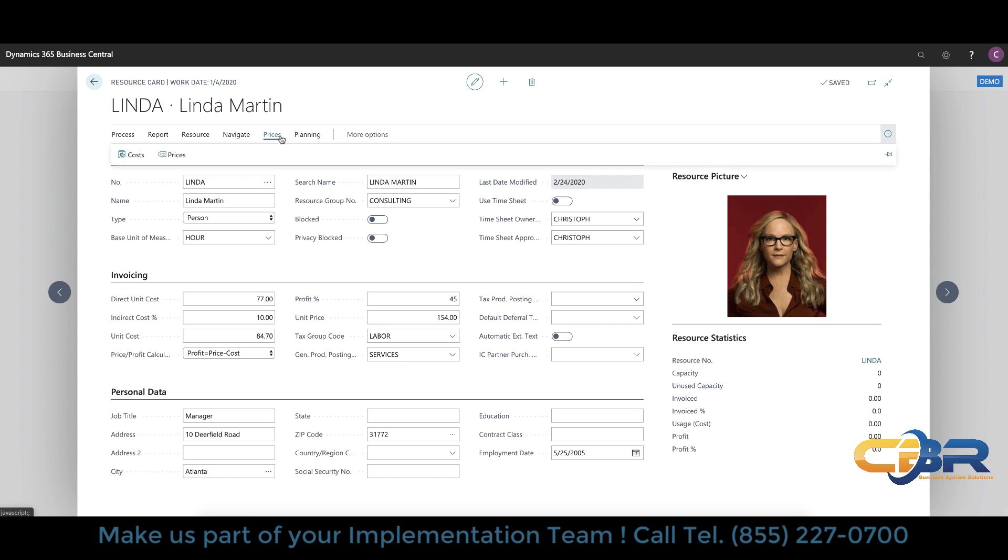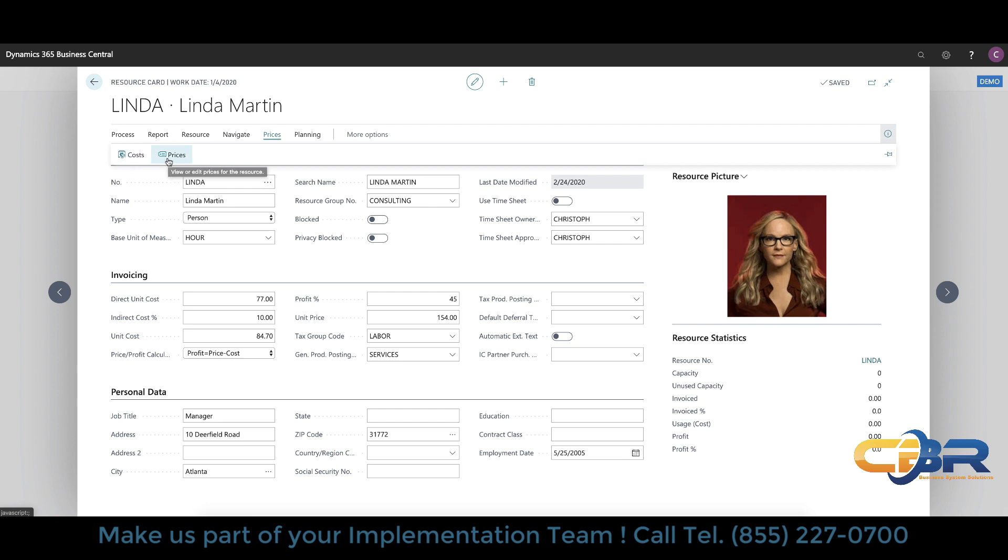In addition to that you can also set up costs and prices for each resource. So different resources might cost you different rates in different markets. So if you're dealing with any sort of prevailing wage situation you can adjust the rates that the resources cost you depending on what area they're working in. Same holds true for prices so that's all done in here. From a planning perspective you can also do resource capacity planning and set up a resource availability schedule and set up vacation weeks and things of that nature when the resource may not be available. So that's all part of the resource setup.